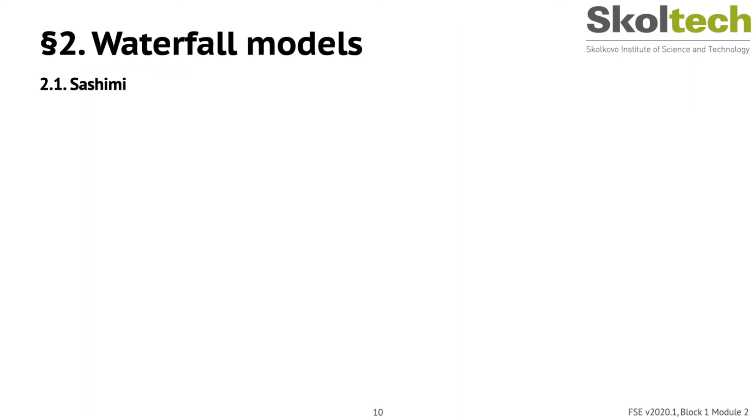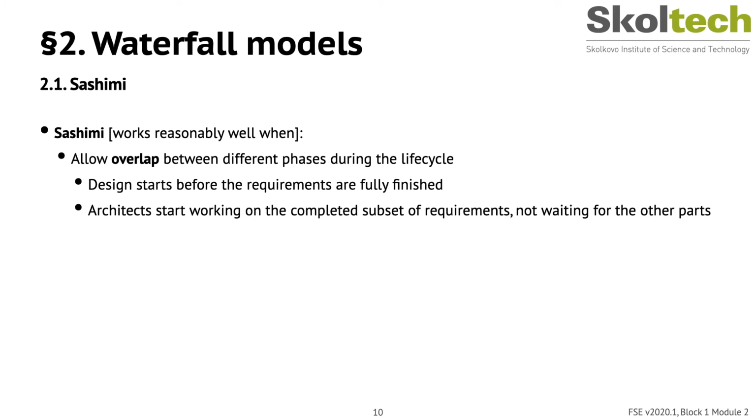And of course, it works reasonably well when your requirements are more or less known in advance. Also, what you can basically do is start the design before the full set of requirements is fully finished, and architects start working on the completed subset of requirements, and the developers can start coding and things like that.